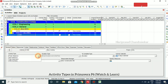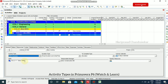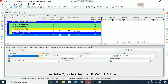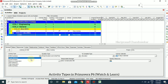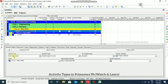Going back to General, WBS Summary is typically used to summarize at the WBS level. A WBS Summary activity comprises a group of activities that share a common WBS level. We cannot assign any constraints to a WBS Summary activity — similar to Level of Effort. These are all the activity types available in Primavera P6. By default, any new activity will be Task Dependent.